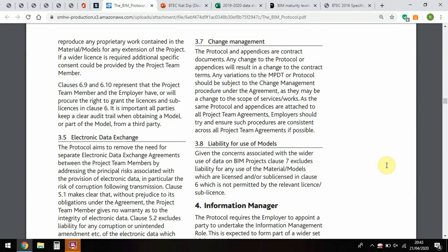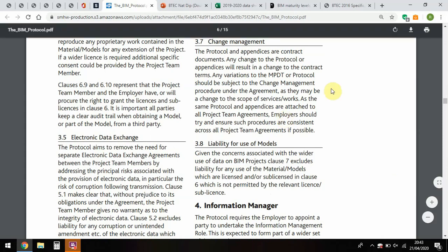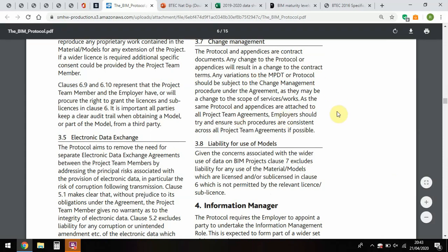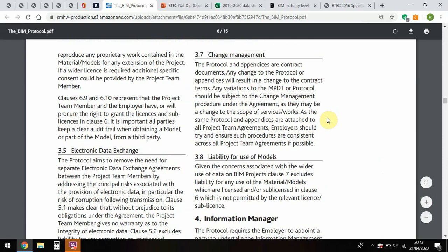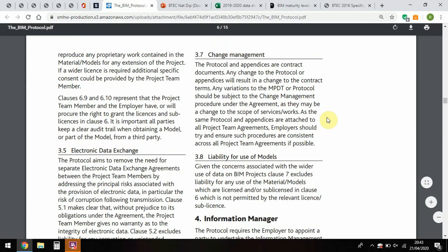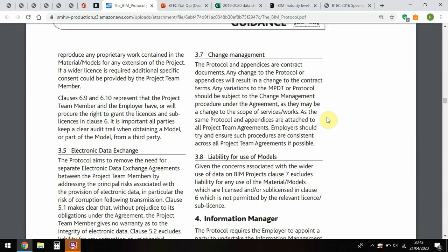Okay, change management here, so what that's talking about is that obviously if you've all got access to the same document and everyone's making changes constantly to that document, you run the risk of something being changed and potentially it then being changed again by someone else, but the first person isn't aware. Or maybe a conversation happens between two people, the third person isn't part of it, changes are made and that third person isn't aware.